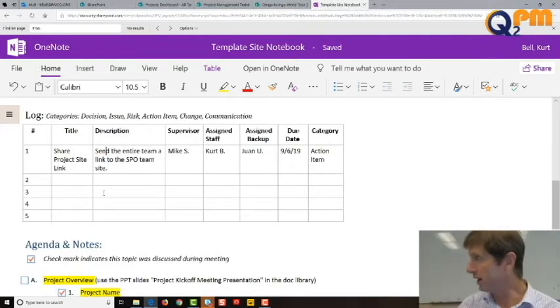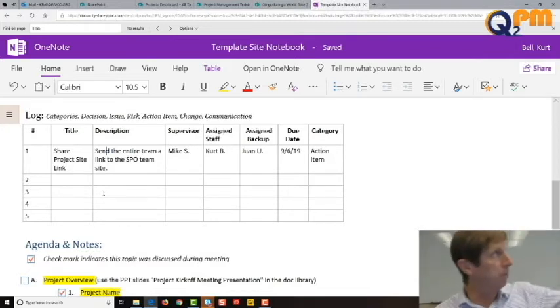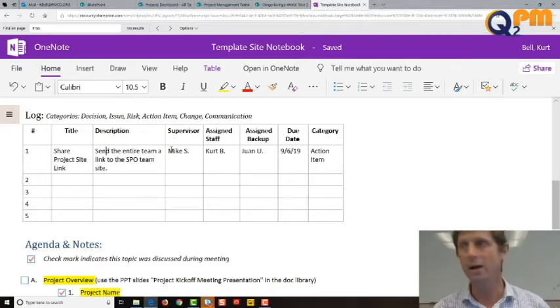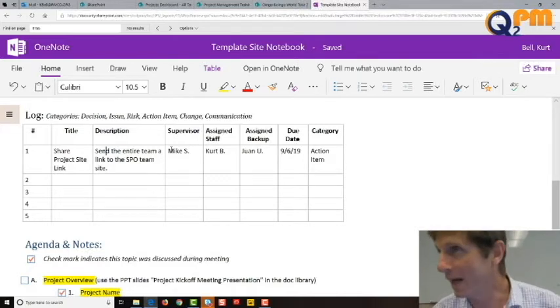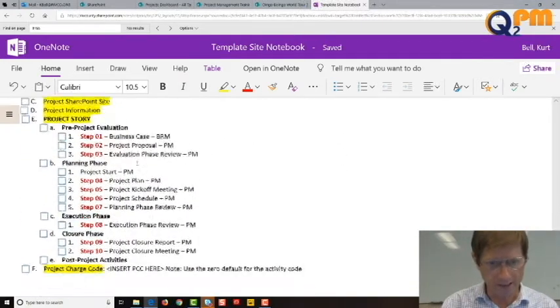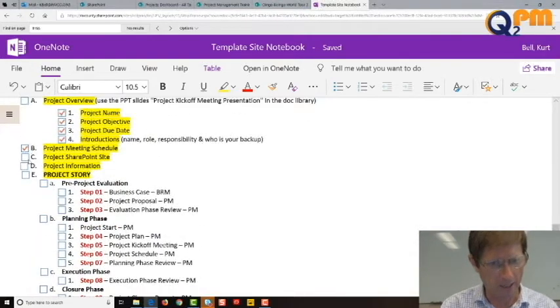Now you see I recorded the action item, explained to them how I'm recording this, and why do you think I'm putting so many names up? Who cares who the supervisor is? Accountability, right. So if Kurt's dragging his heels, I can go talk to Mike. If Kurt calls in sick, I can go talk to Juan. I'm covered, yeah. All right, so scrolling on down, we've got the SharePoint site.